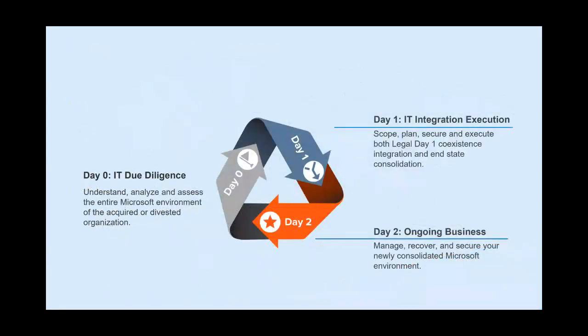And when we talk about the big approach here in tenant migration, we can say, listen, in day 0, it's about due diligence. So really understanding, analyzing the systems, doing proper assessments, and then day 1, scoping, planning, securing, execution of what is planned.